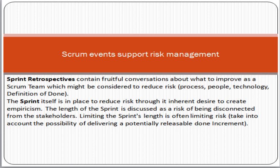A sprint is a three to four week time period. Whatever issues there are, you can get feedback from the customer within three to four weeks, as compared to traditional project management where you might only get feedback after four or five months. Since you are getting feedback at a very early stage, you can manage problems and issues early. So a sprint by itself is a very good thing for risk mitigation.